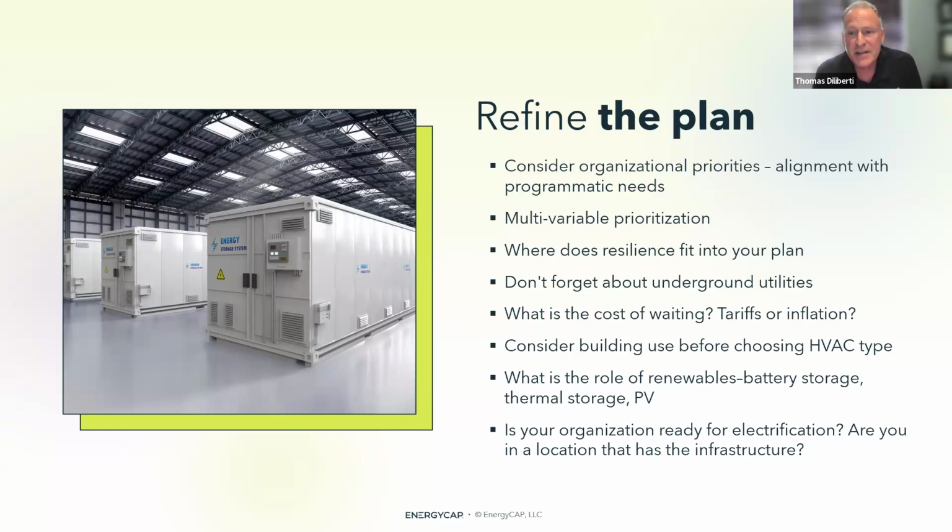Other considerations at this stage is, where does resiliency fit into your plan? There's a lot more pressure on organizations now to look at resiliency as part of their plan. Well, are you ready for that? Do you have the money to do that? This is the time when you should consider it. Something that gets neglected are underground utilities. People forget about those, and so you can't ignore those. Those facility condition assessments many times don't include those things. So don't overlook that, budget for that, think about that.